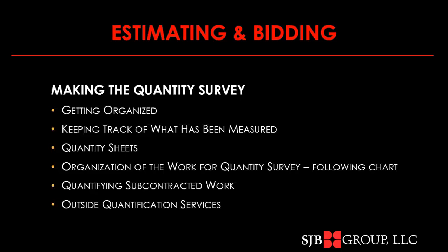It may help you understand some of the special problems encountered by the specialty subcontractor. It helps you evaluate the time allowed and required for the subcontractor's work. It may help you develop a price to cover a scope of work that is not present in the subcontractor's quote.